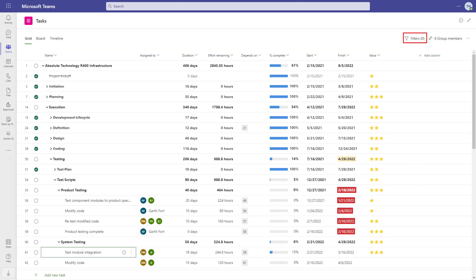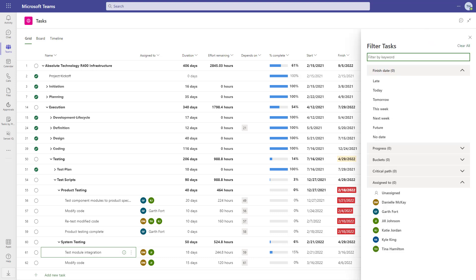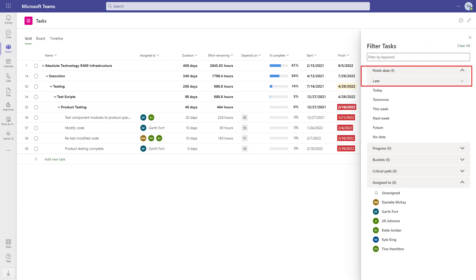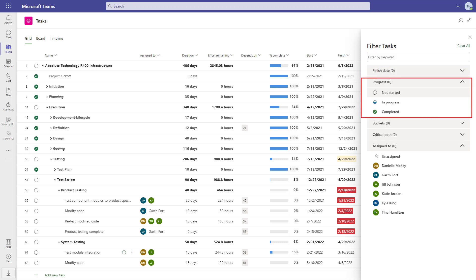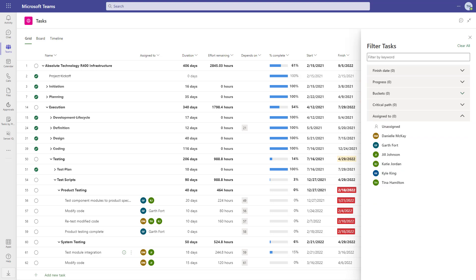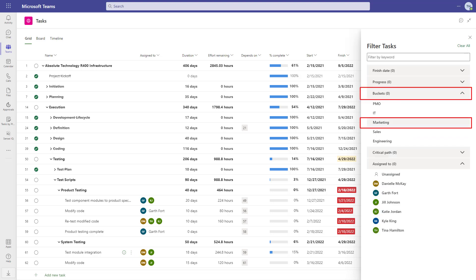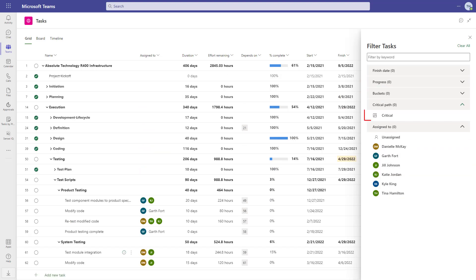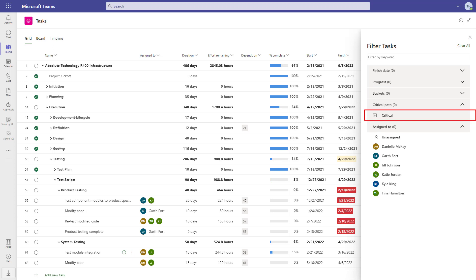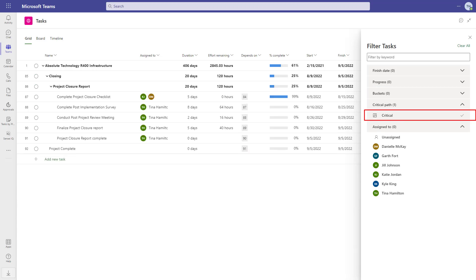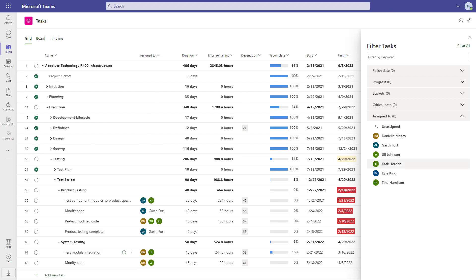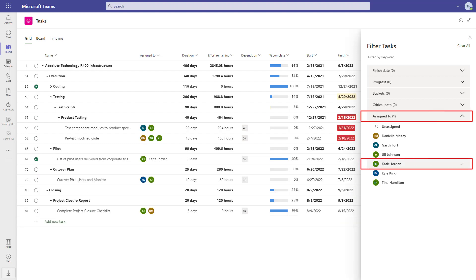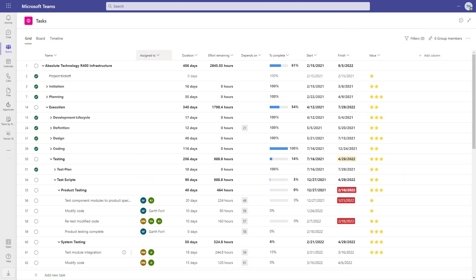All three views come with the ability to filter the tasks. We can filter for finish date — for example, those tasks that are running late. Progress to see tasks that are not started, in progress, or completed. Buckets to filter for marketing tasks in this example. Critical path — and in the timeline view, these tasks will also be highlighted in red as you may be used to from the desktop client. And finally, assign to, which is a great way to see what each team member is working on.